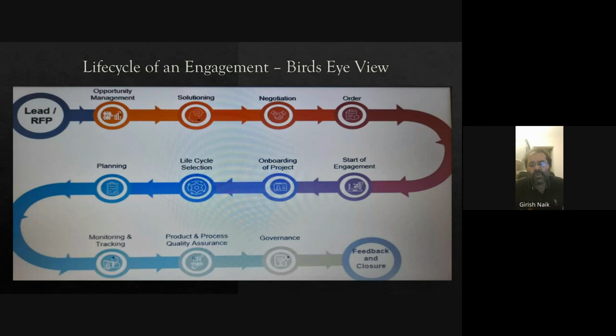If it is not ready, right, there are glaring problems, which are very visible and we can't deliver without fixing that problem. We make that a no go. You can't deliver to the customer unless you fix the problem, right? So that's what we do in the gating. Then that problem will be fixed, then it will be delivered to the customer. So this is how the quality assurance takes care, right? So this we call product assurance.